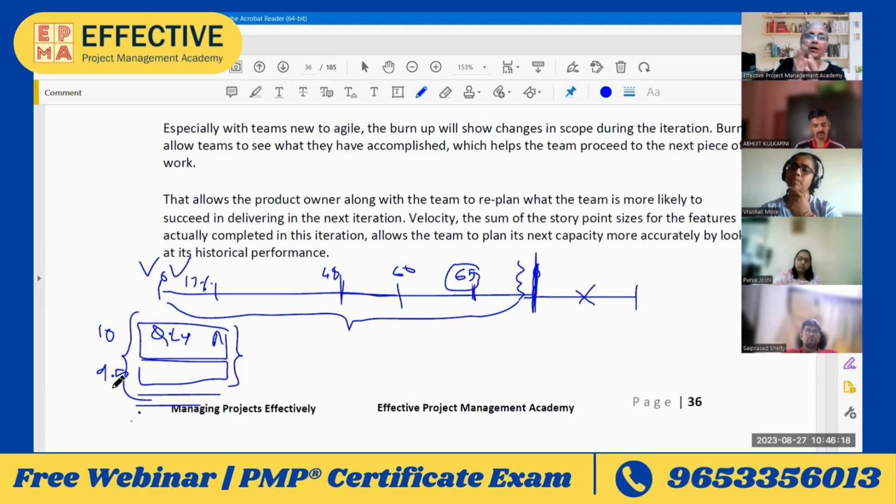We are not computing the work in terms of total percentage or earned value. Only whatever is completely delivered or deliverable, that is what we are counting. So that's why agile measurements make more sense, because that's something that a customer can actually use. Otherwise, what's the point in saying 65% work is done and the customer says we cannot use it? So that is where agile measurements would score.